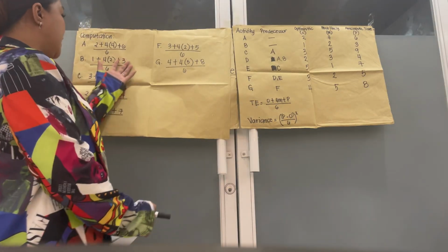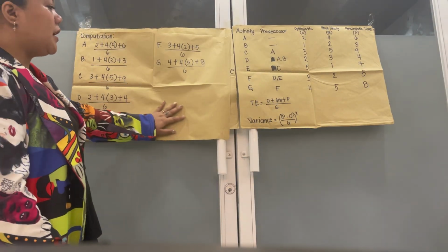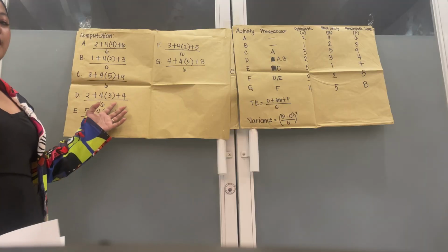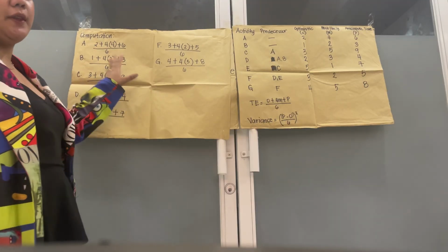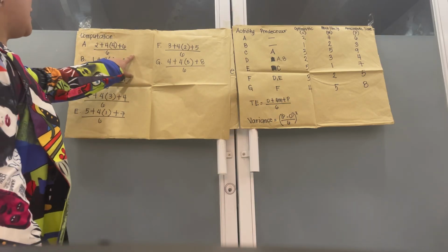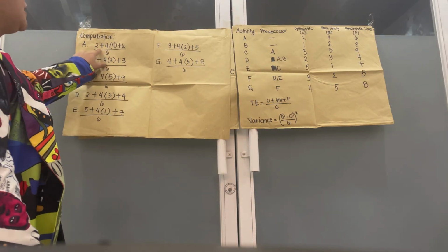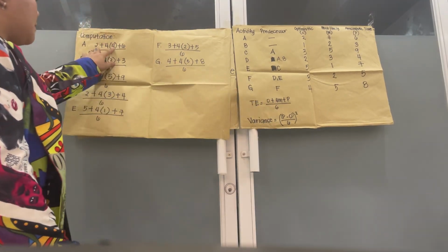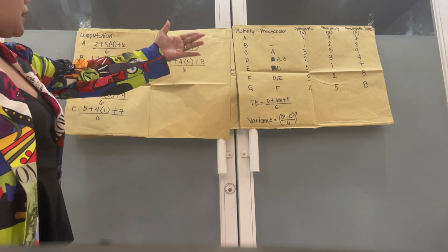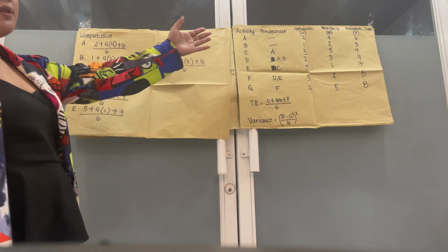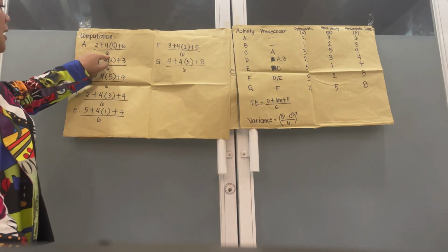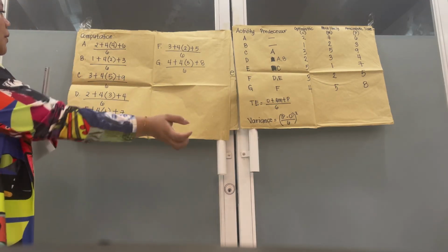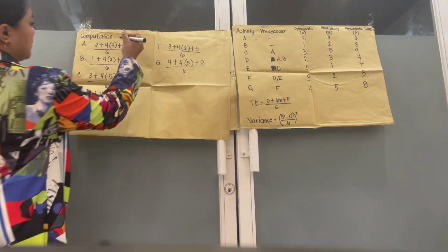So now I have also done arranging the expected time, which is this. So now we proceed to computation. So letter A, the optimistic is 2, plus 4, the given number, times 4, which is the most likely, plus 6, which is the pessimistic time, and also we have 6, the given number. So now we proceed to compute this.